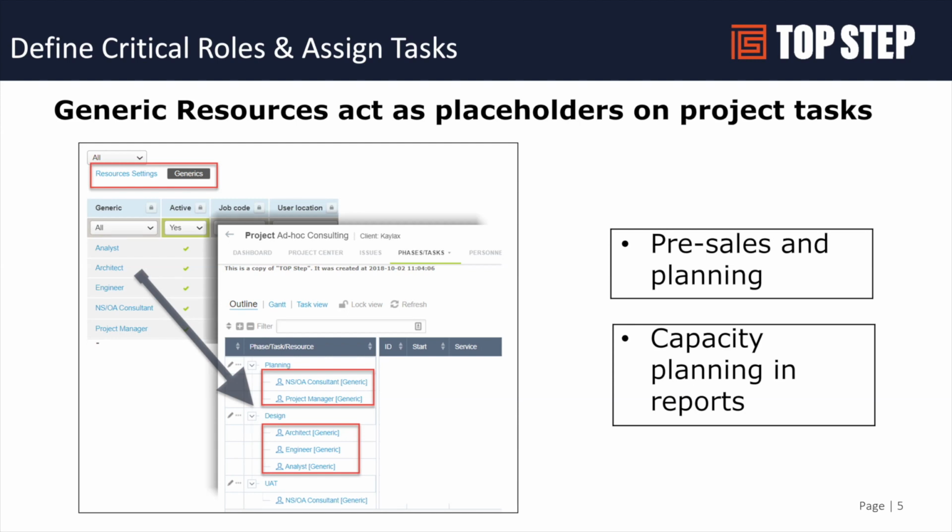So if you are able to get those set up, a lot of customers of ours, including ourselves, will then use templates to have a start of building a project. And within those templates, we'll have multiple phases and tasks. And then within each task, we can have placeholder resources. And this is really beneficial. We can also embed hours for each resource if you're doing hours at the assignment level, or you can do hours at the task level as well. There's pros and cons of both approaches here.